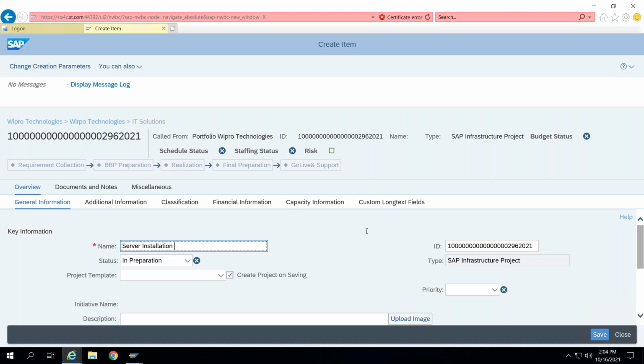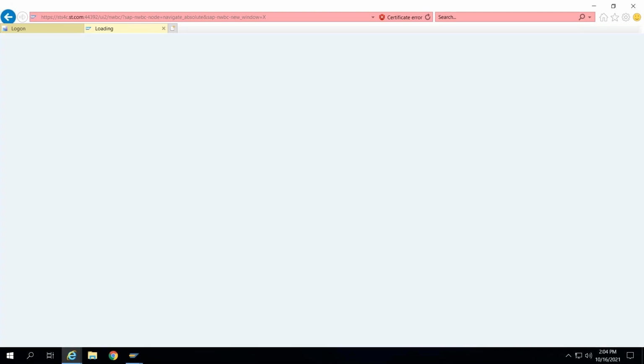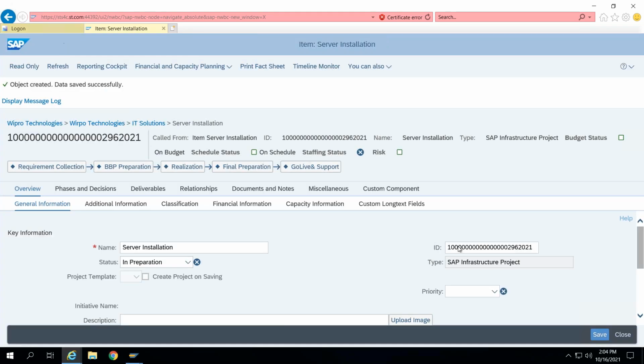Here the important thing is that this ID will not work, because in project system I'm using a coding mask. So it has to be compatible with my coding mask, only then will it work. In this system I'm using the ECO coding mask, and I'll say it's 2001.